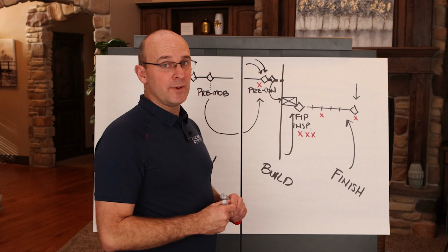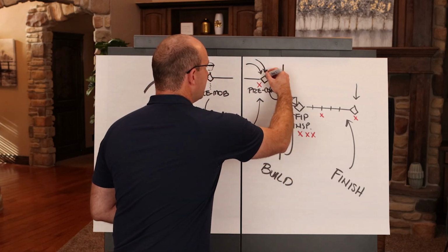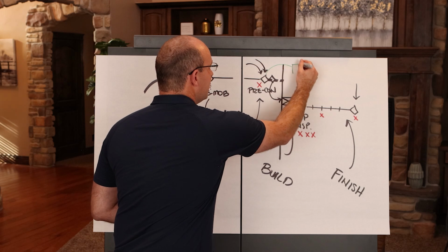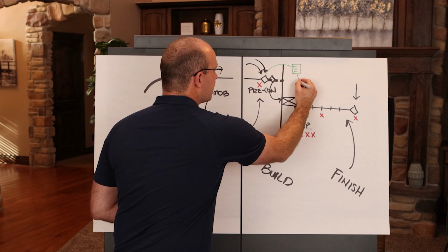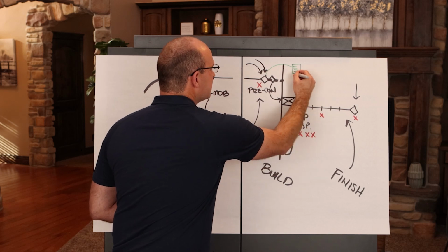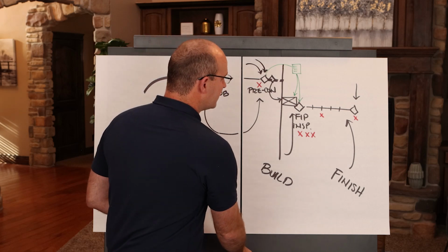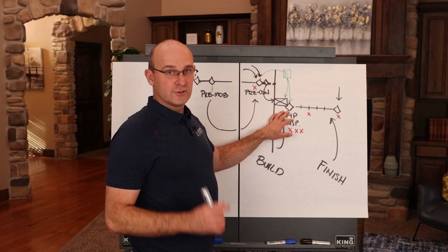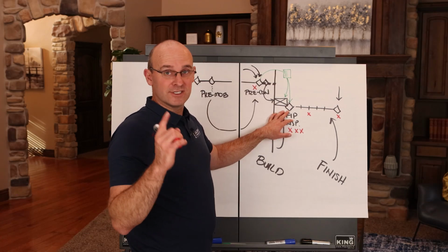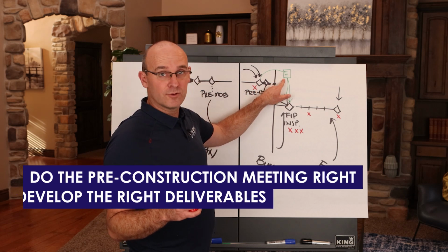And I do want you to remember that when you host this pre-construction meeting, you'll read the plans and the specs, and you will develop a checklist or a visual checklist that the crew can use for the installation of their work, and you will verify that that is clearly articulated so that the crew can actually install it the right way.